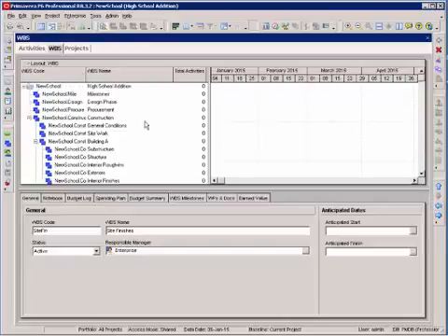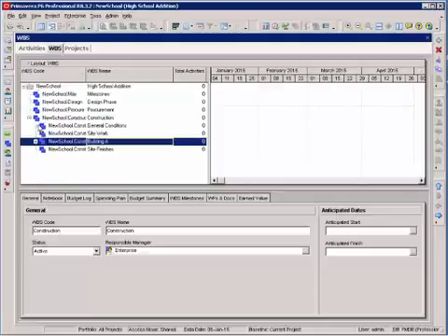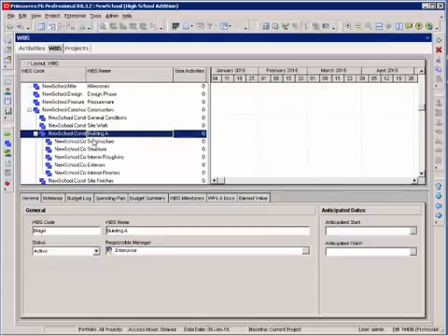So once again, look at my work breakdown structure. If I summarize construction, I have 4 elements in level 1. I have 4 elements of level 2: general conditions, site work, building that I want to build, and site finishes. In my building, I have 5 categories: my substructure work, my structure, interior rough ends, exteriors, and exterior finishes. The more detail you have in your outlines, the fewer activities you have in your work breakdown structure, making it much easier to schedule. In all of your table areas, you can always sort by selecting a heading.